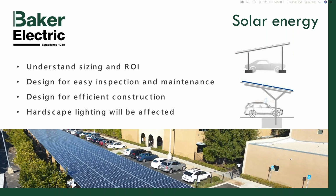a lot of trees are removed in the effort to put these solar carports in. So understand what rules surround any protected trees, memorial trees, or anything in your area or jurisdiction that's protected, or that your community would not be happy with. Those are the types of things you would also want to consider in the planning phase, where you're trying to decide what areas are acceptable to locate these systems.